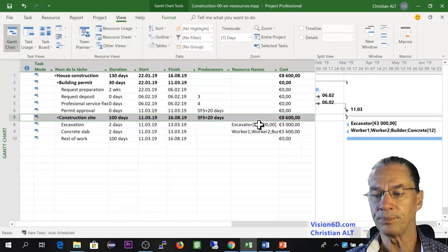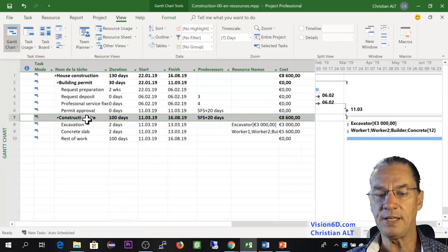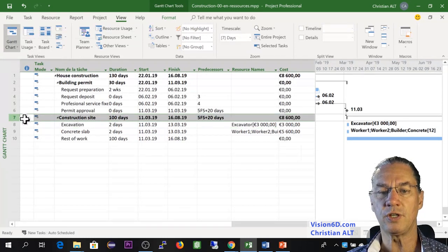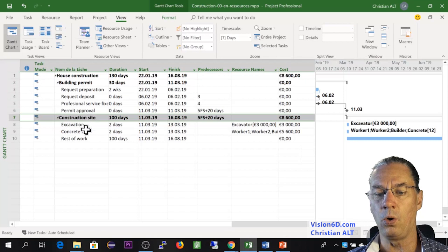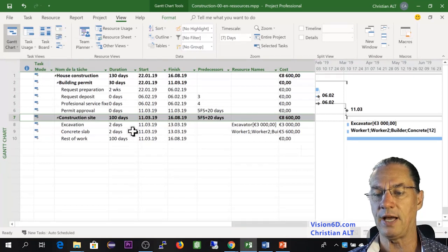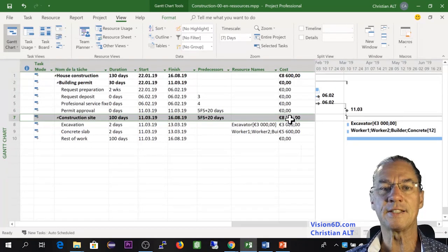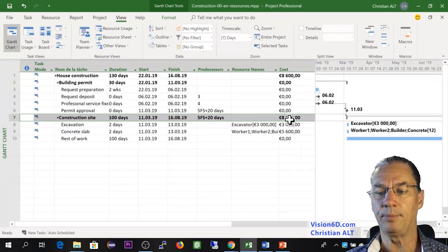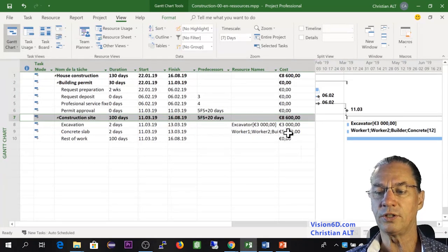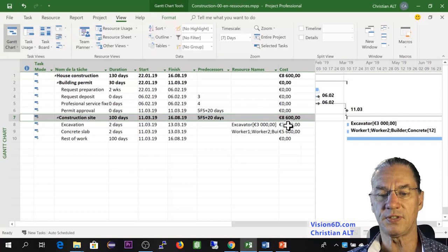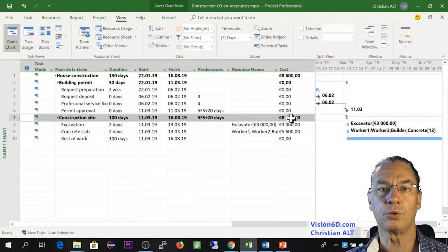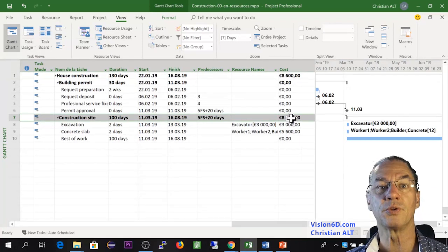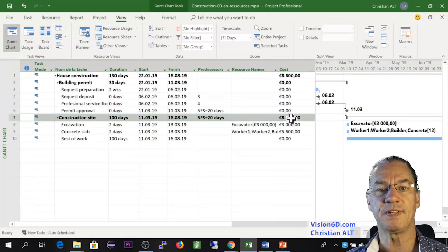By the way, here you see that on this line, which is a summary task summarizing all the other tasks, it's now summing up all the task costs here. So this makes those 8,600. So we can say that the construction for the moment costs 8,600.